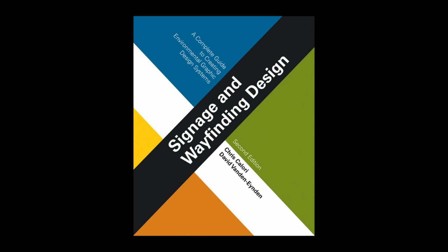Regardless of the sign typing technique you choose, each sign type is assigned a code, typically alphanumeric or a combination of the two. This code is a shorthand way to refer to everything that comprises a given sign type. For example, the aforementioned sign type A is a code that succinctly refers to a large exterior, internally illuminated, ground-mounted pylon. As such, the sign type code is an essential element of the sign message schedule, which is used to track and inventory each and every sign in a program.